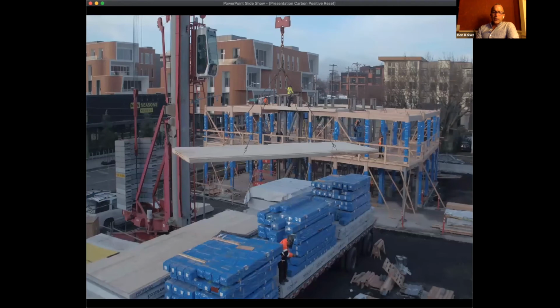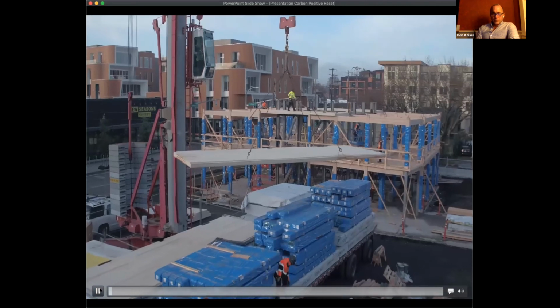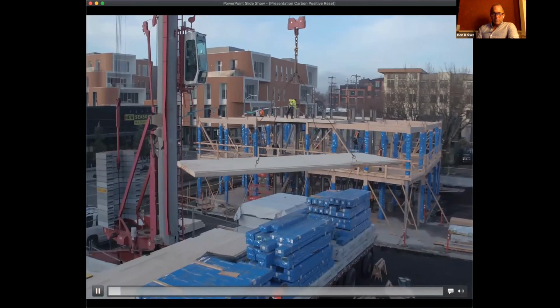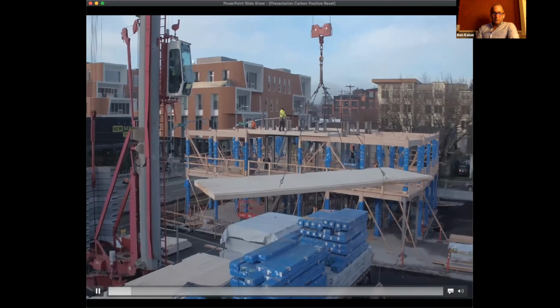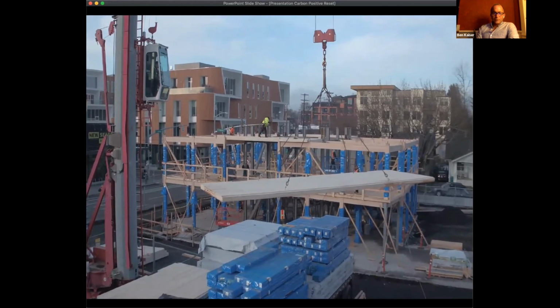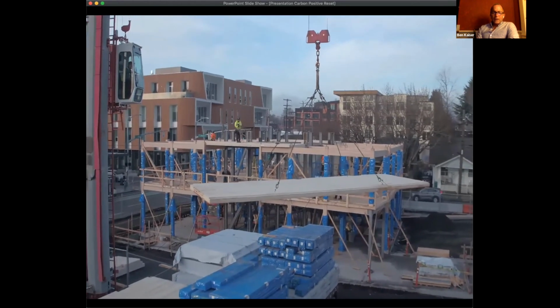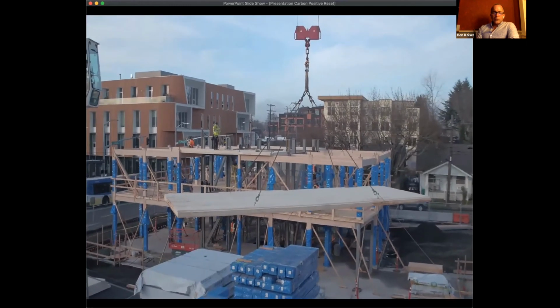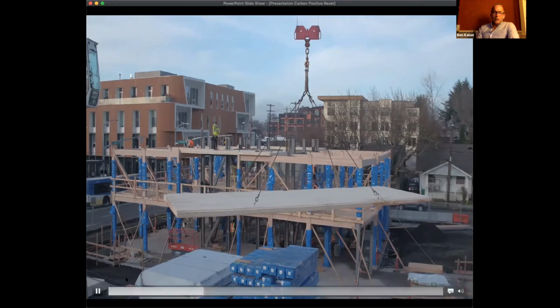This is a brief video. If you hit play on there, Lindsay, it'll start. It just shows the clicking together of these products. Sometimes it's an intense video, but this was, as Julian said, about 4 people erecting this building and doing about a floor every 4 days. It's kind of interesting. You can go to the next one, Lindsay. That's a hard video to load.